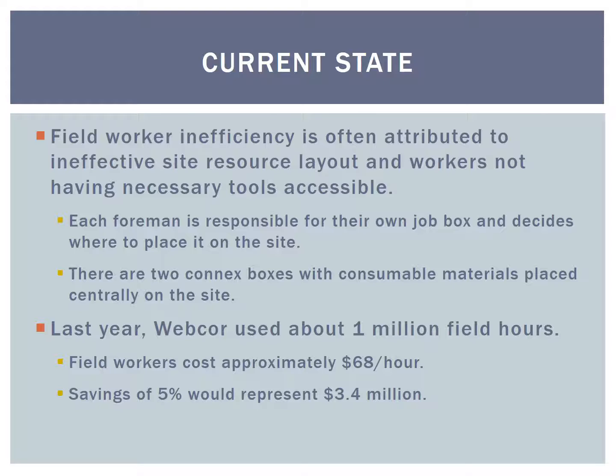In addition, I performed a business case for pursuing this project. Webcor informed me that last year they used approximately 1 million field hours. Their field workers cost approximately $68 per hour, so a savings of 5% could represent $3.4 million in savings for Webcor.